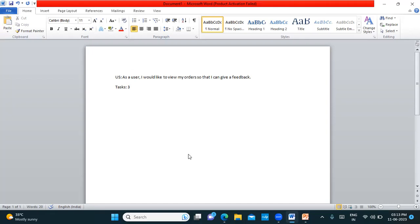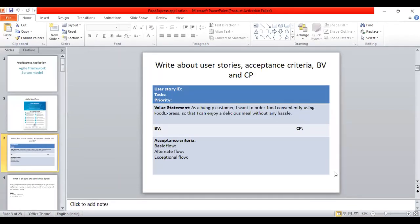Priority is the importance given to a user story. We prioritize using two approaches: MoSCoW and MVP (Minimum Viable Product). MVP refers to the essential features that must be delivered to the client right away. User stories are prioritized with numbers — one, two, three — or using Low, Medium, High. The main purpose of priority is to assign importance to a user story.